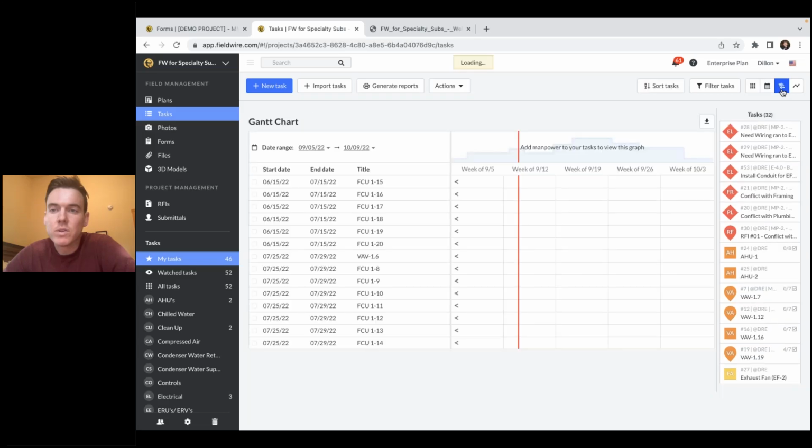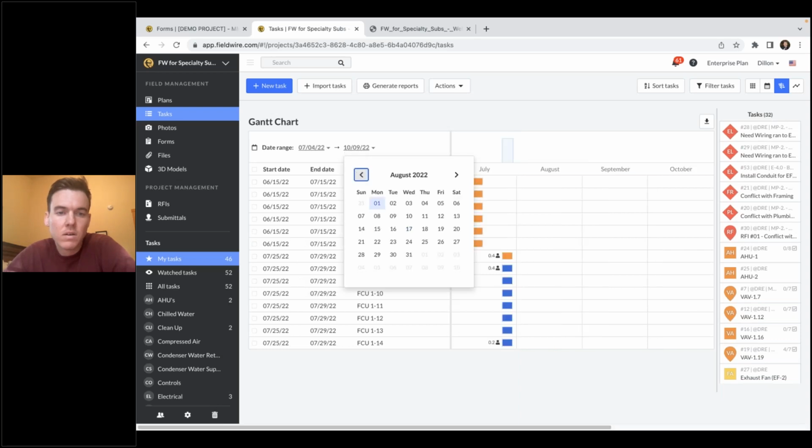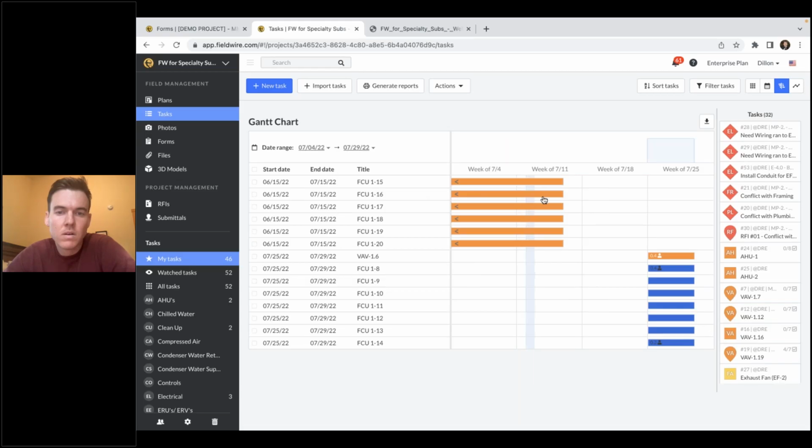And in the Gantt chart view, I can do a similar thing, but I can also view manpower and see concurrent activities. It's a similar view, but I have all these concurrent activities on this entire week. And if you notice here, I have these man hours, or guys, for each one of these activities. If I hover over this, I can see, okay, I require one guy for each day. And obviously, the other ones don't have man hours associated with them.